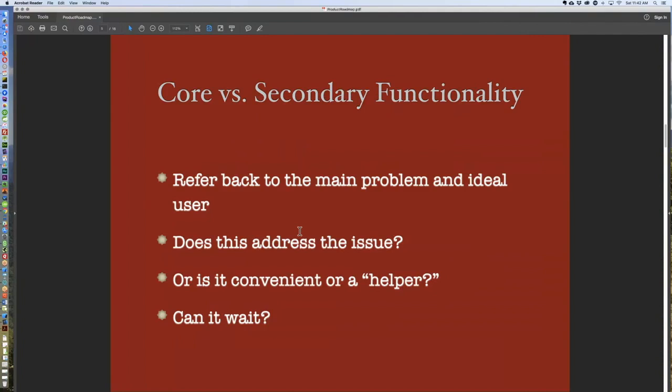It's get something that is functionally solid. And of course, the most important question on whether you scope it or not, keep it in or push it to a future, is, can it wait? Is this something that we could put off? Is this thing really useful that somebody could use it today, but it'd be nice to have this other stuff? Well, if they can use it today, then that can it wait disappears.